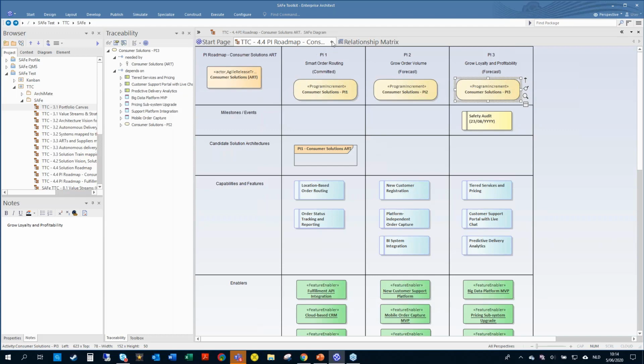and hence you can move forward on that. That's how you can translate the actual work that needs to be done, architectural work that needs to be done in the form of enablers, and functional work that needs to be realized in the form of capabilities and features towards the teams, empowering them to define their stories, to define their enablers. And as a system architect, they're going to make sure that also there the balance is safeguarded between the right amount of enablers, the right amount of features, and also the right amount of technical debt that needs to be resolved. That's the capacity planning approach SAFe advises upon.